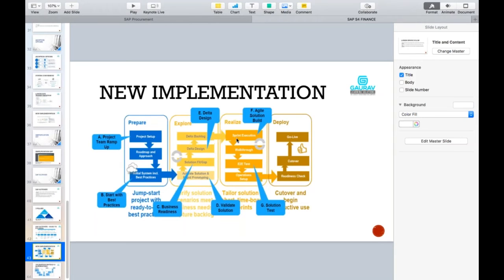Now again in realization, normally what we do, we complete the realization in 4 months. So 4 months, no interaction with the customer, because the customer has finalized this list and we are working on the configuration. After 4 months, when we complete the realization phase and ask the customer to test, on day one itself he raises a lot of problems. Why? Because we understood the requirements and created a document, but when we performed the configuration, we had not seen this document correctly, or there could be any number of issues because of which we were not able to replicate what was expected by the customer. So what happens is you waste all those 4 months, and again there is a lot of rework.